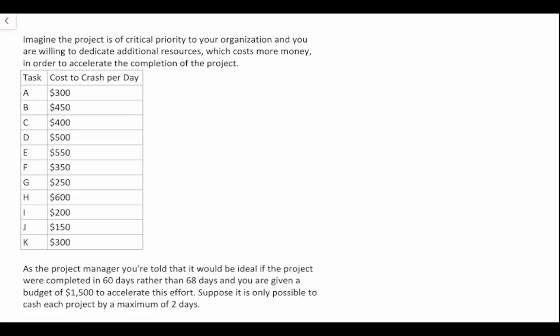Imagine the project is of critical priority to your organization and you are willing to dedicate additional resources, which cost more money, to accelerate completion. As a project manager, you're told it would be ideal if the project were completed in 60 days rather than 68 days, and you're given a budget of $1,500. Also, it is only possible to crash a project by a maximum of two days.